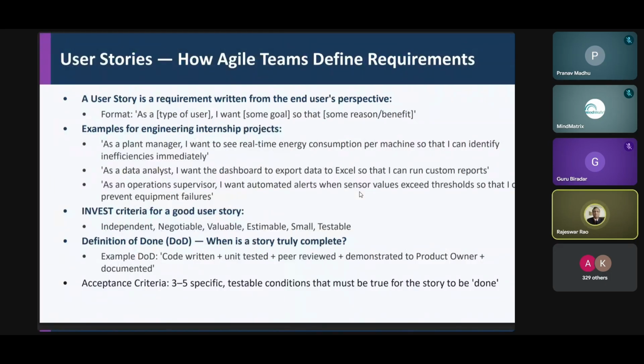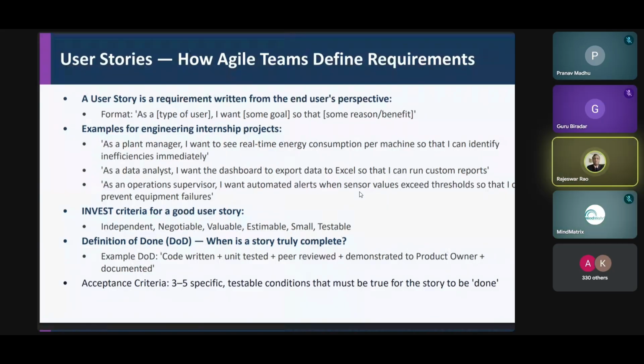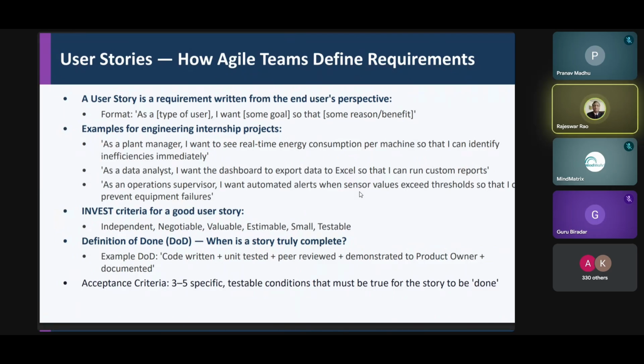The project is described and estimated based on the number of use cases. So when you're doing an estimation, you have to break down the PRD into a number of use cases. And before the use cases, you have to break it down into user stories. This is where the value of talking to the customer regularly is an extremely important element in the success of a Scrum project.